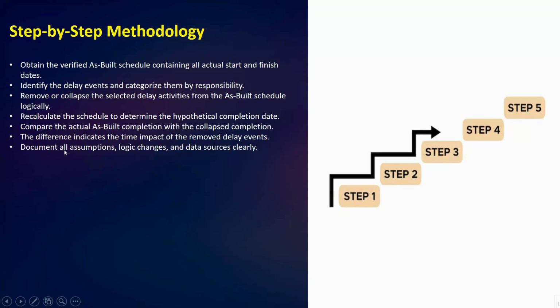Then next we have to document all the assumptions, logic changes and data sources clearly. We will clearly record all the assumptions, data sources, logic revisions, and supporting evidence to maintain transparency and credibility of the analysis. Proper documentation ensures the results are defensible and verifiable. I hope the step-by-step methodology is clear.